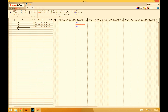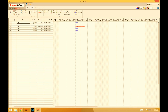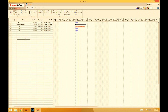As we're getting more tasks, the overview can become more complicated. So what I'm now going to do is group some tasks. I'll add a small task here — call it 'Group of Tasks.' I'll then select the following three tasks which I want to group, right-click on the numbers out here, and select 'Indent.' Now I've grouped the tasks. I also want task one to come before task three, so linking these tasks is done by clicking on the bar, holding the mouse button down, and dragging it down to task three. Now they are linked — this means that task one needs to be done before task three.